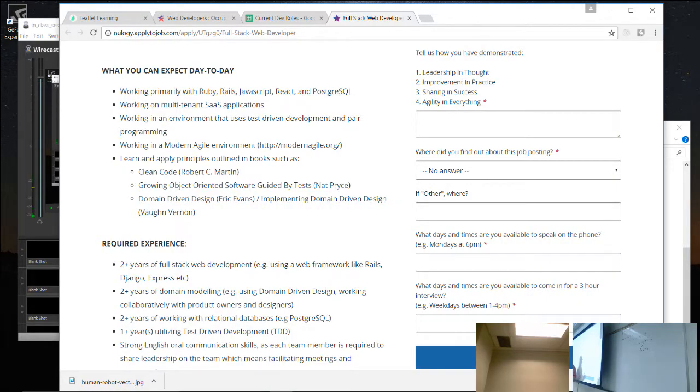The point I'm making is that when you think of stakeholders, you've got to get down to more specifics. So typically, you'd say something like the sports fanatic. That tells you something. This isn't a casual sports fan. This is the sports fanatic. What do they want to do? Well, they want to see current scores for their top 6 hockey teams, maybe. So what will they do to do that? They see an informational grid or something like that. So this is like a typical user story.